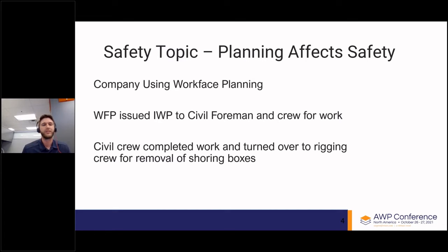In a previous role, I was heavily involved in contractor safety management at one of our larger sites, and going through incident investigations and doing root cause analysis, incomplete planning was often identified as a latent or management system root cause to injuries and near misses. One such case that we had resulted in an employee falling into a trench excavation. While the employee was not injured, the potential for significant injury was significant in this situation.